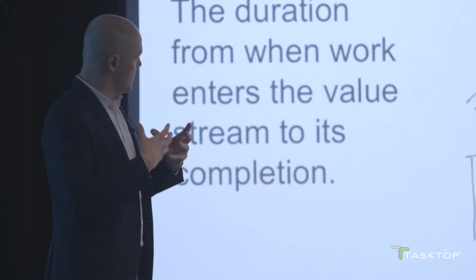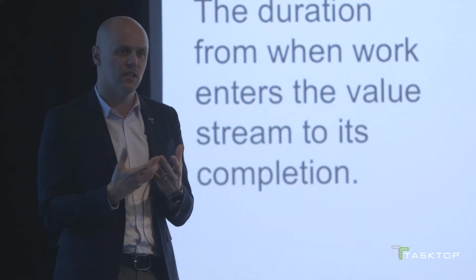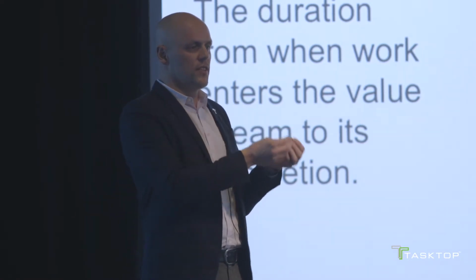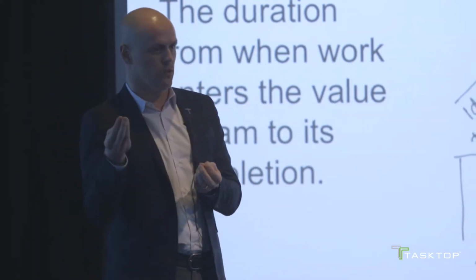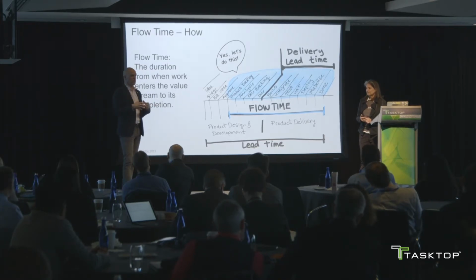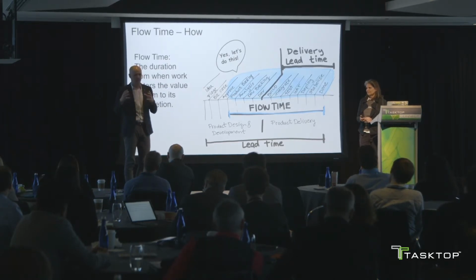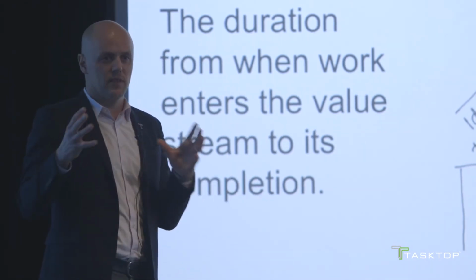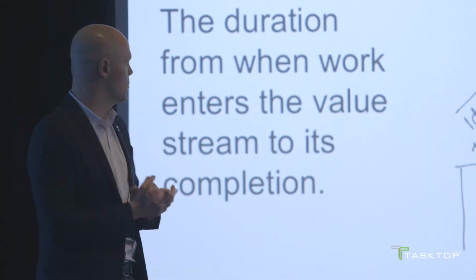So the measure of lead time, actually, I learned from Dominica's book, because I had some frustrations with it myself. It's also wrong. My frustrations came from the fact that when I was working in open source projects, it was nothing like working on car orders, right? Every car that is ordered from BMW ends up delivering at some point. Lead time matters. On a popular open source project, on a popular product, the number of requests could be 1,000 times the amount of work that you do, right? Apple has millions of open requests they're not even going to look at any point in the future. So you basically have infinite lead time. The lead time metric itself does not make sense for popular software products that have more customer requests.